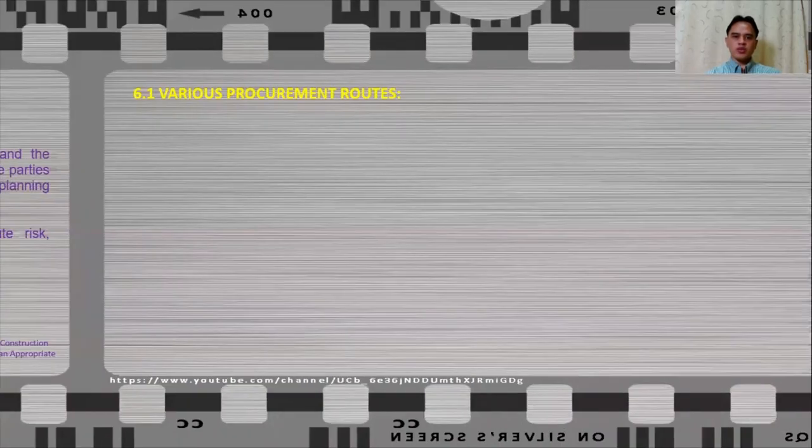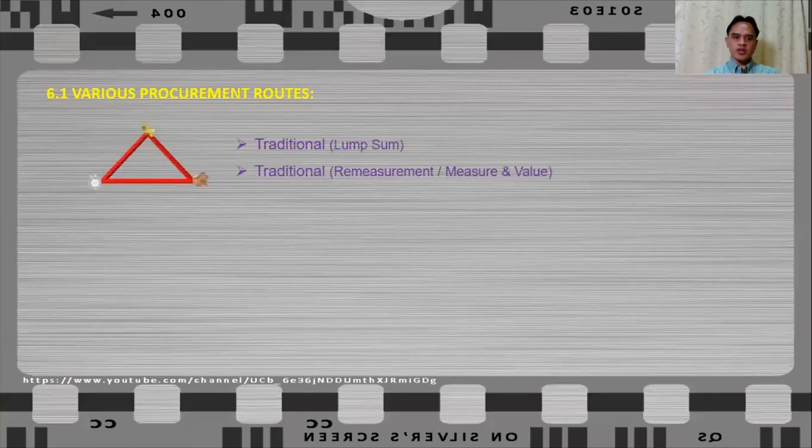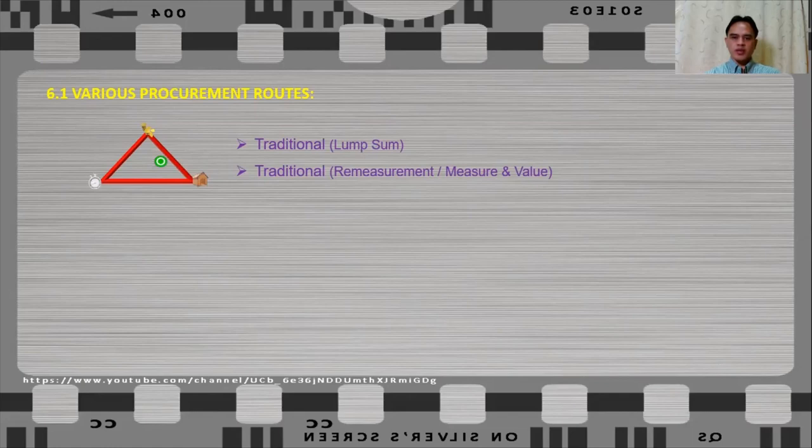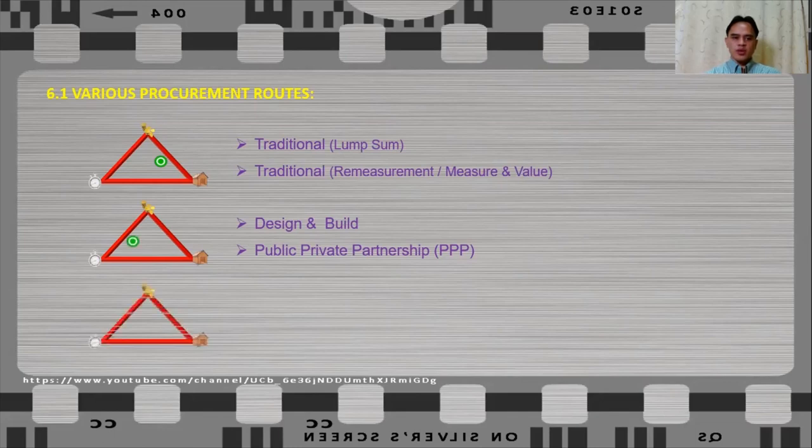Now, the different procurement routes are traditional, that is either lump sum or pre-measurement, which is also known as measure and value. Traditional procurement route gives more emphasis to cost and quality. The next is design and build and public-private partnership or PPP. These procurement routes give more emphasis to cost and time. While the procurement route that gives emphasis to time and quality are construction management and management contracting.